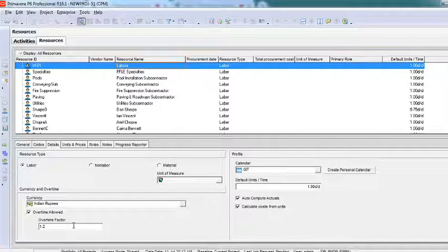By default it is unchecked. By default it is not working. By default it's not allowed to work overtime, because you know that overtime is not allowed as per government rules, as per labor rules. If you are making them work overtime, you will have to pay more than 1, that is 1.2 minimum.